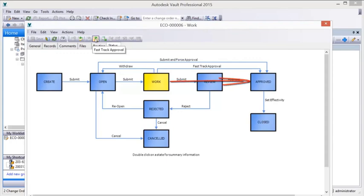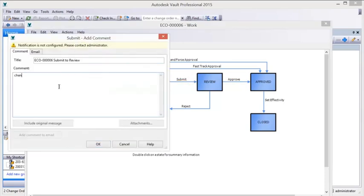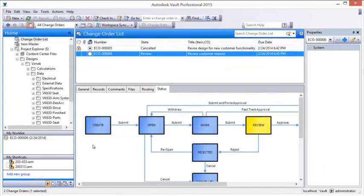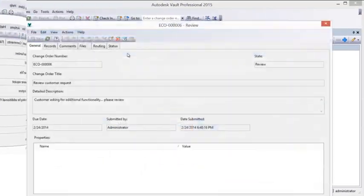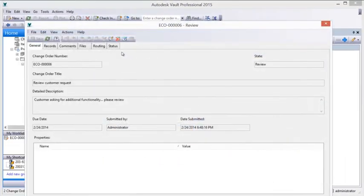Once changes are verified complete, a final approval is given, a date the change will become effective is set, and the change order is closed.